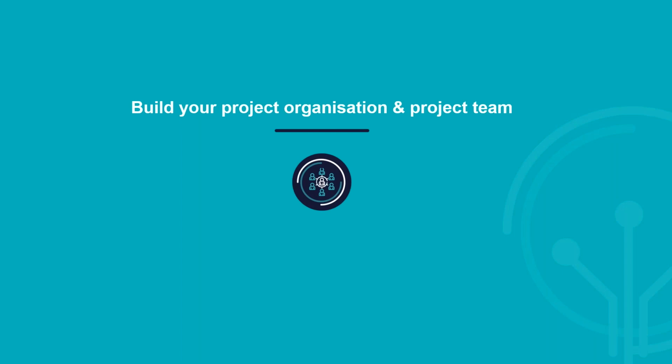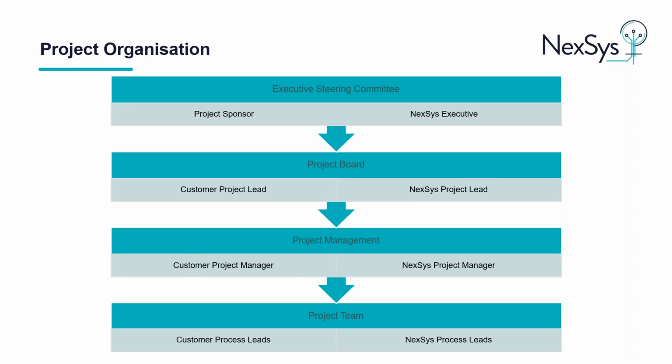Build your project organisation and project team. A large-scale project requires various project roles to be fulfilled, both on your side and ours here at NexSys. For each level of the project organisation, a customer representative and a NexSys counterpart are required. At the highest level, we have the Executive Steering Committee, which consists of the project sponsor on the customer side and the NexSys executive. The next is the project board, which consists of the project leads from the customer and NexSys.